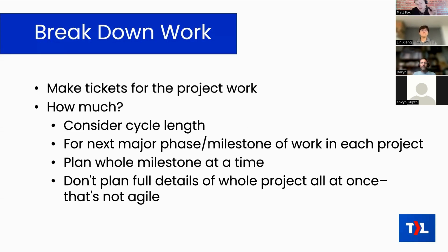So consider, whereas previously if you had a big project with a bunch of milestones, you would typically do all the planning for all the milestones at the beginning, it's preferable to split that into one project per milestone. That way you can avoid selling or committing to a certain budget on those projects until you get closer to actually delivering them. And that allows you to integrate all the learning that you're doing throughout those one-off projects.